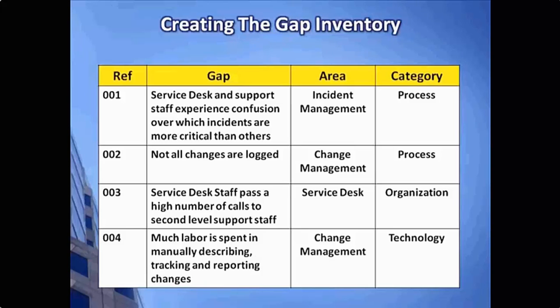We'll start by putting a simple spreadsheet together. The spreadsheet will be used to literally document all the gaps and findings in our assessment and show how we took each one of those and translated that to create an initial win project. Again, the benefit of this spreadsheet approach is that you can sort by any one of these columns and always go back to how decisions were made in terms of the projects that were selected and how the prioritization was done.